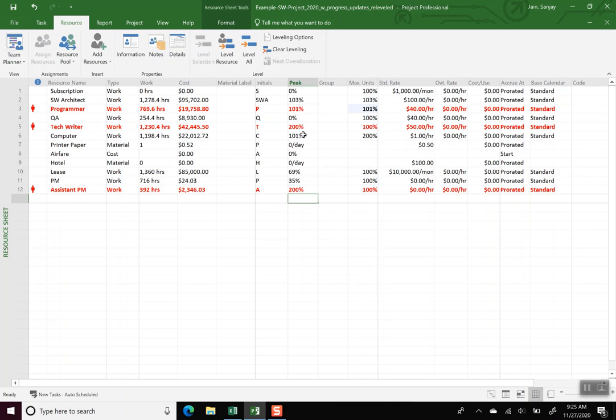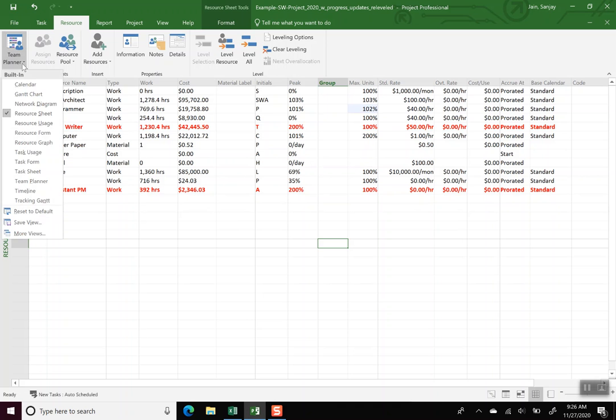And so these two over-allocations are really two activities overlapping. That's the overlap we are trying to get rid of, not these minor increases because of the status updates. This one, let's make it 102. And so these are the ones that we want to address. So after doing this, let's go back and see if we do better this time.